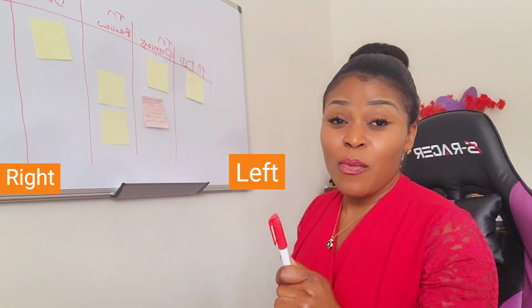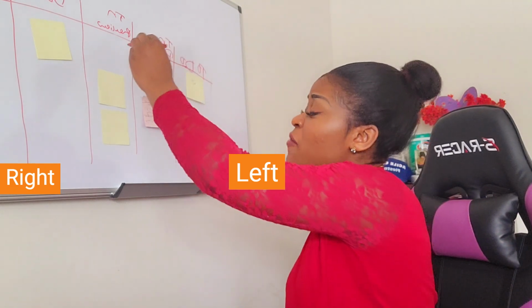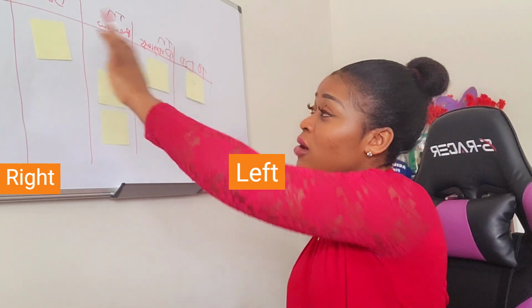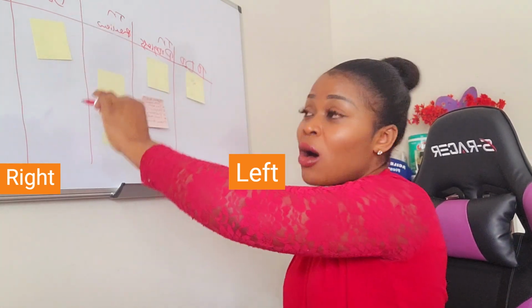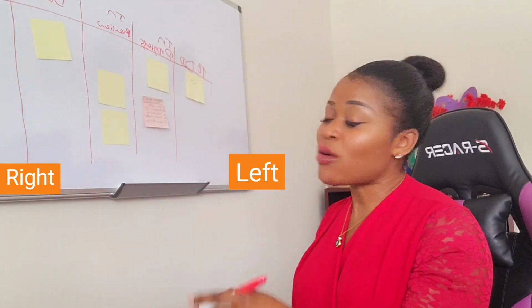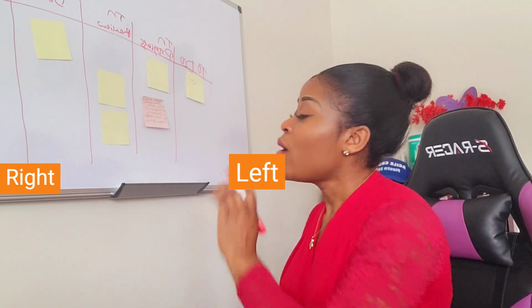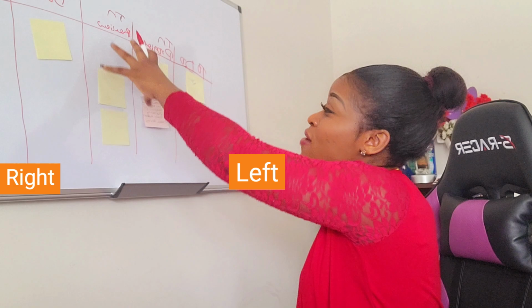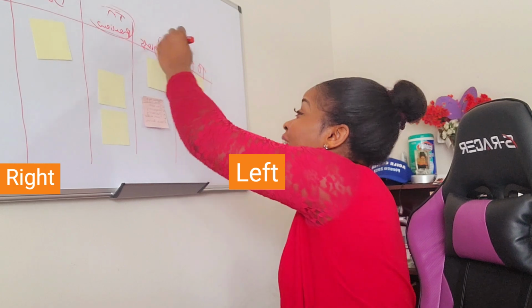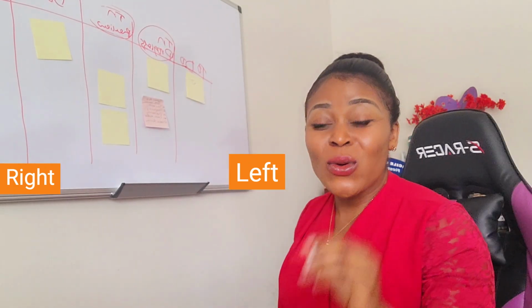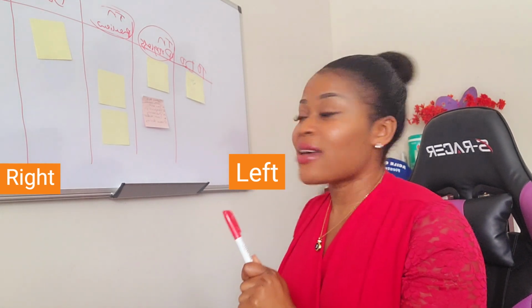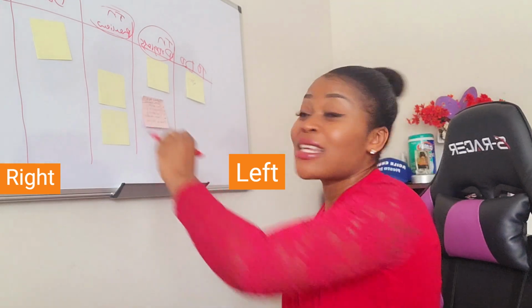So instead of calling people out individually, I'm going to be focusing on the work items. In this case, all the things that are already listed in the done column, I'm just not going to talk about yet unless team members have anything to contribute towards that. Okay, we will be interested and glad to know. But I'm going to focus more on the review, because one thing I've noticed is that this in review column and in progress column are usually those 2 columns that create a bottleneck, and we end up with so many items that are almost done.